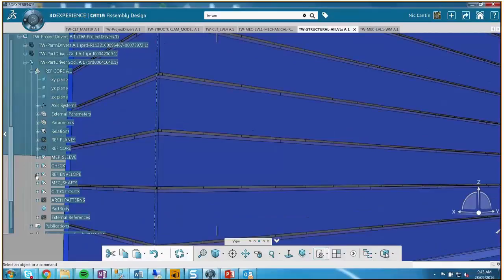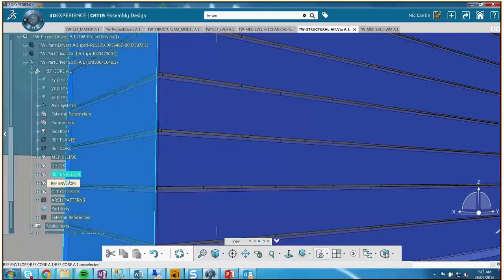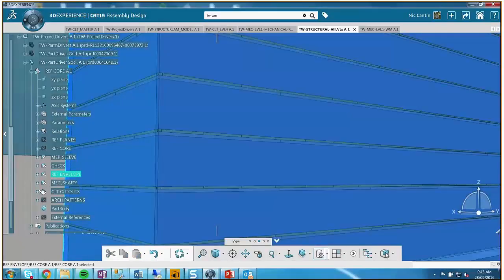But I think that's the idea: we're going to try to learn from this and say, okay, how can we do the walls faster? Mm-hmm. Because the plumbing stacks that we showed, the prefab, they're flying it up at like 30% of the labor they used for a recent project that's basically the same size, but in concrete and was stick built. So there's been a lot of good learnings on the job for sure.